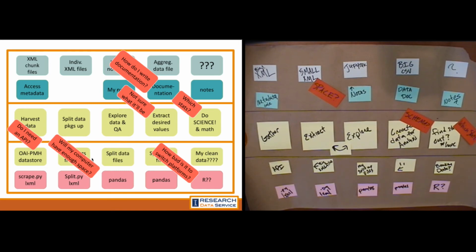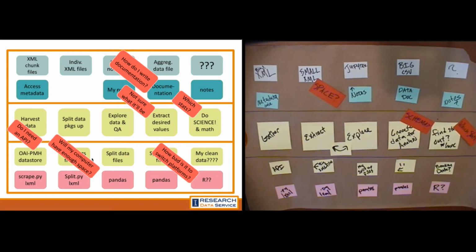My usual suggestion is take a picture of it, and if you have that relationship to your PI or to your colleagues, email it or text it to your colleagues and ask them, is this your understanding of this project? Because when you do this inside of teams, let's say you have a team of 5, and you have everyone independently do this, you're going to see them expand their sections and collapse other people's sections. And so you'll better understand how they see the project.